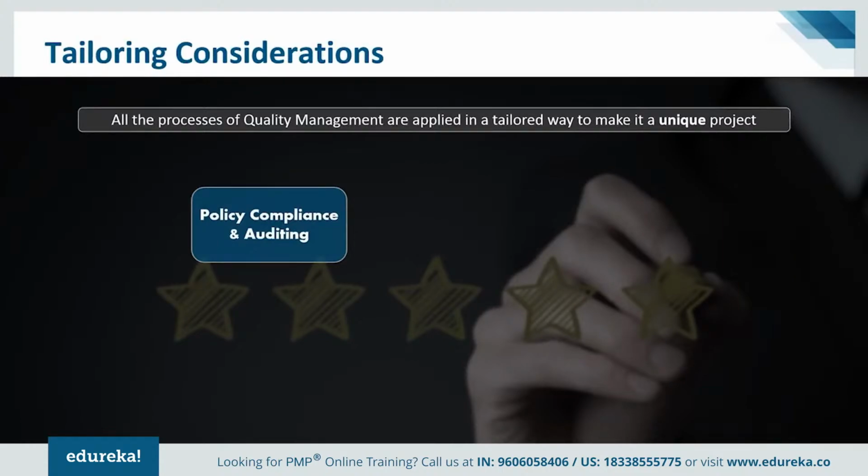For example, I still remember when I was working on a project where we had to comply with SOX compliance. That means the requirements were completely different over there. We had to take the code freeze approvals at least 14 days before we put code into the production environment. That was something very unique to that compliance requirement. And that was audited as well. So we had to really retain those audit trails and those evidences, which we could then produce when the audit is conducted.